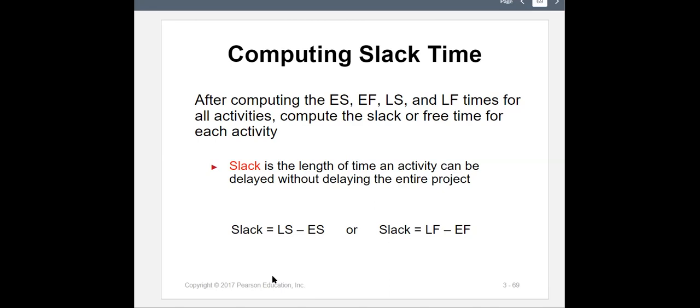Why do we need to know slack times and which tasks are critical? It's important because as a manager, for critical tasks you need to make sure you have a professional person doing it, that the machines and all the facilities are working well, everything is correct, you have more control over it, and you have more data collection on those tasks.